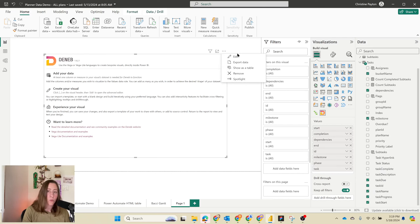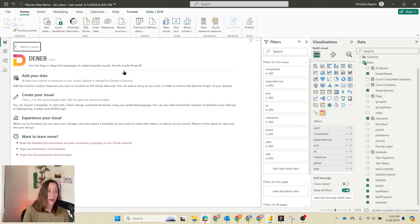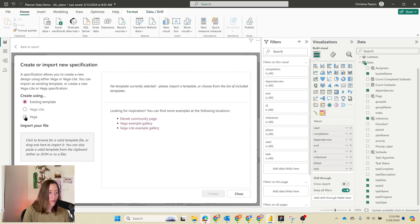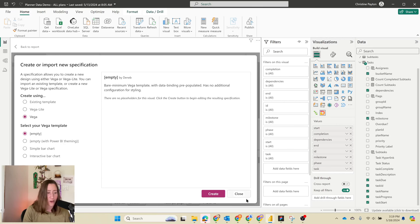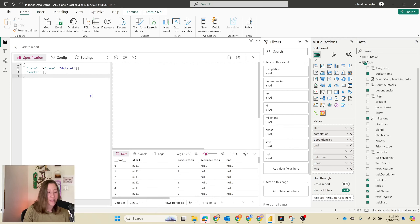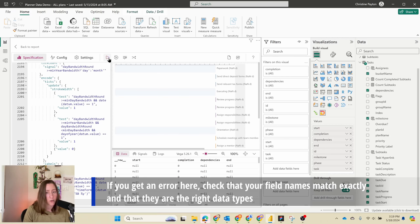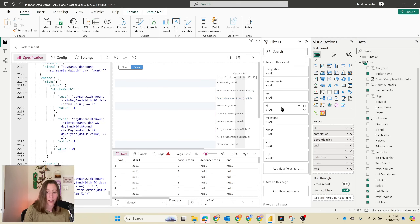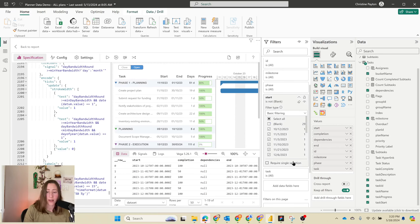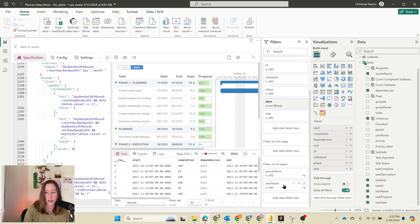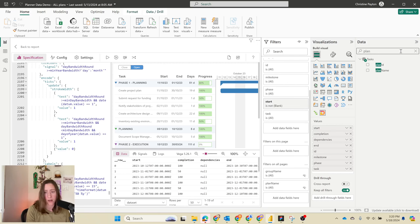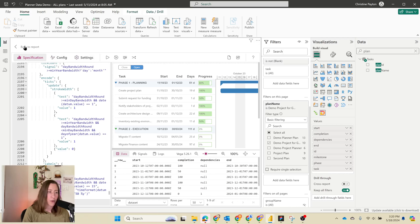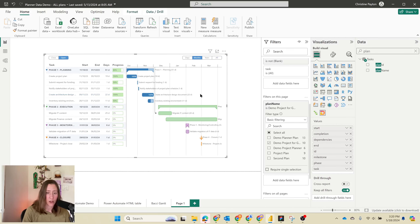Now we're ready to go. Let's see if this worked. Go to the ellipses menu for this visual, click edit, and then select Vega — the 'create using Vega' option down here. Don't do Vega-Lite; I accidentally tried that first and it didn't work. Click the create button, then paste in that JSON we copied from the template, and push the play button to apply. This looks really funky to start — that's because it's pulling in a bunch of task data that doesn't have start and end dates. I'm going to filter those out — select all and remove blank. That looks a lot better. Also just going to filter this down on the plan name.